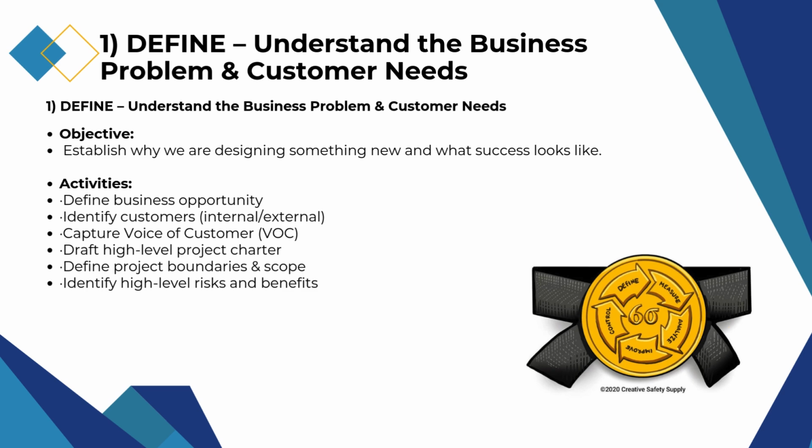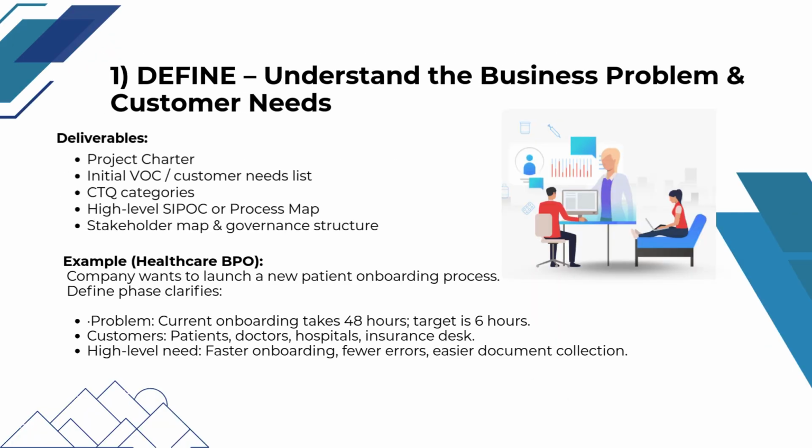In the define phase, deliverables typically include a project charter, an initial VOC or customer needs list, CTQ categories, a high-level SIPOC or process map, and a stakeholder map with governance structure.